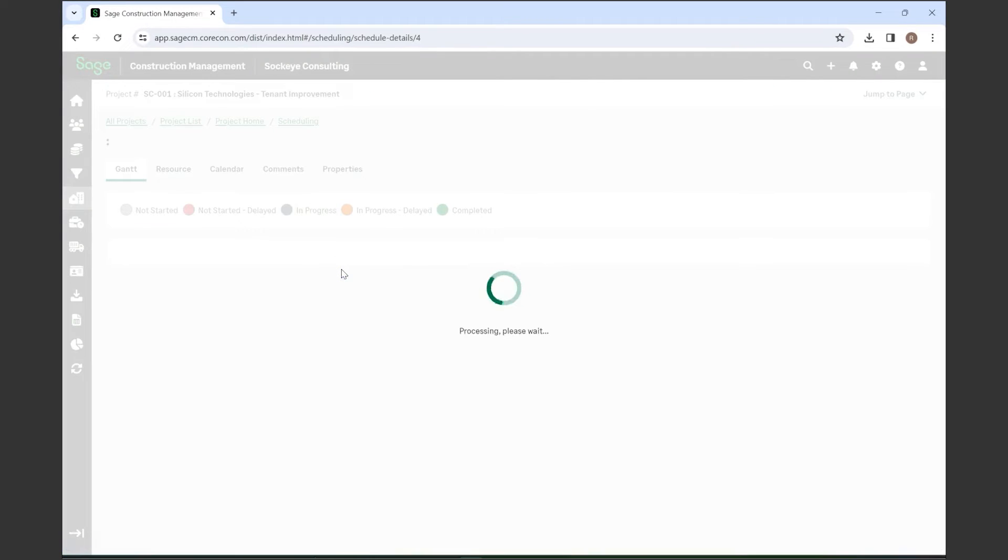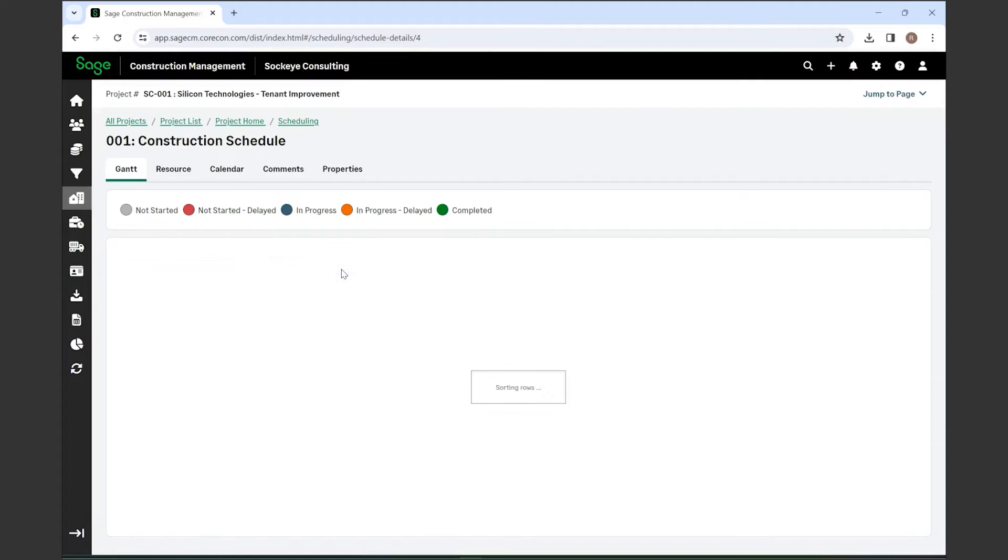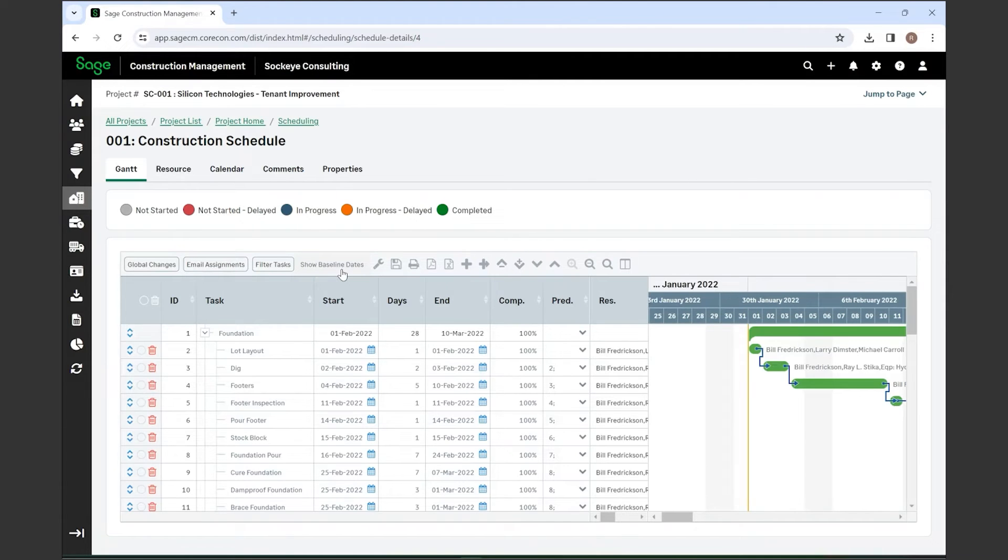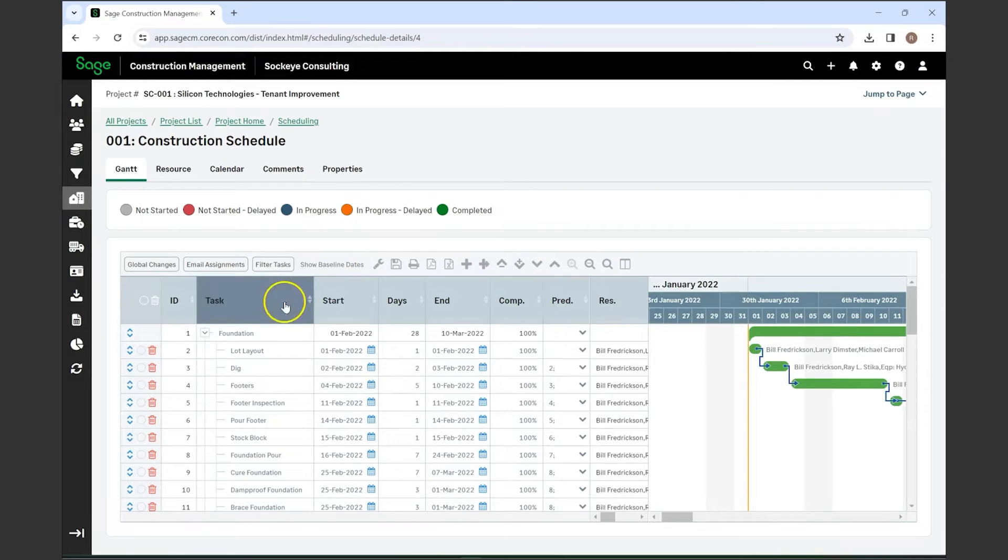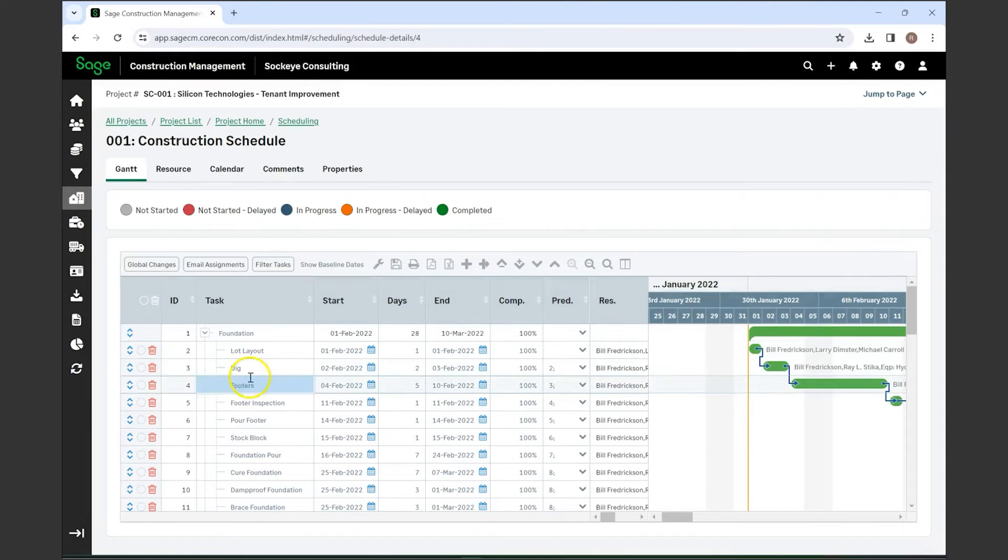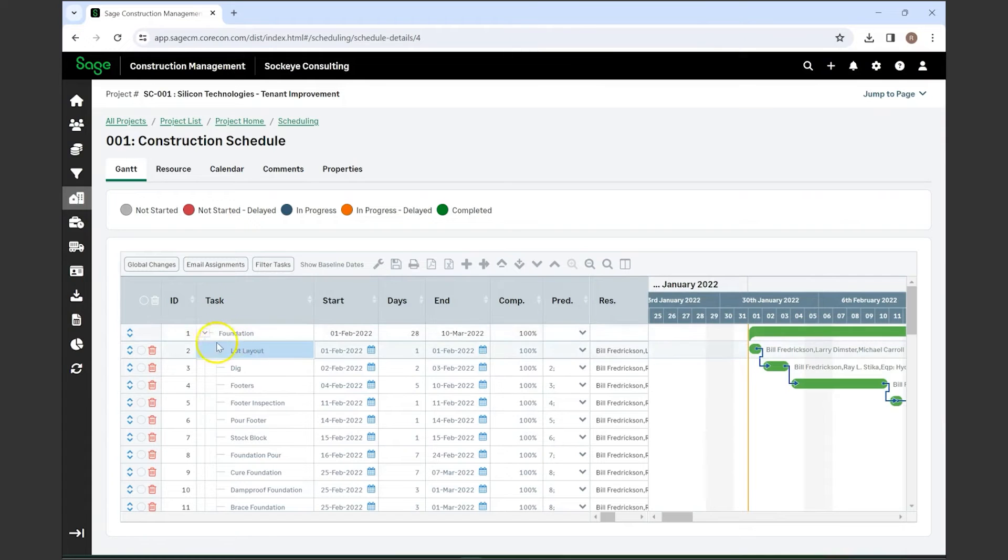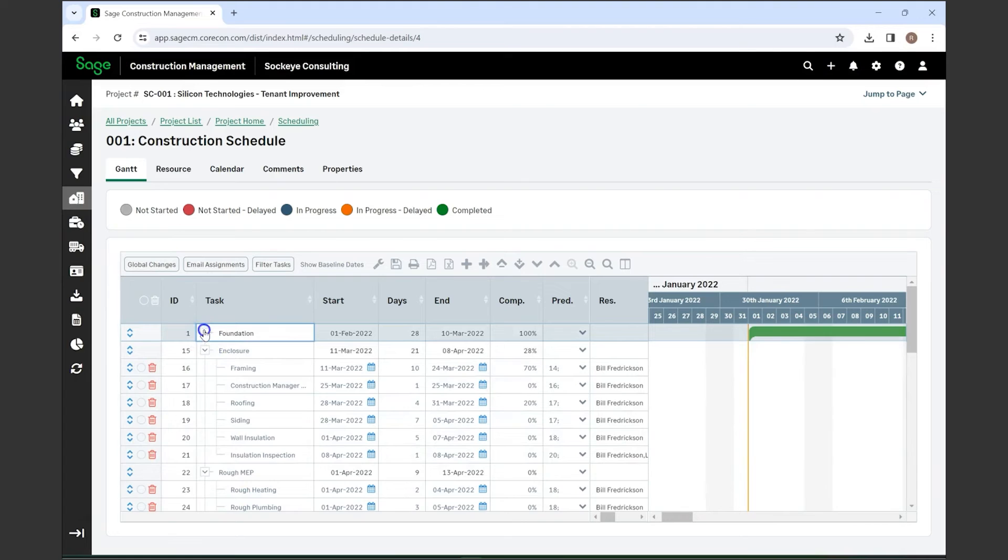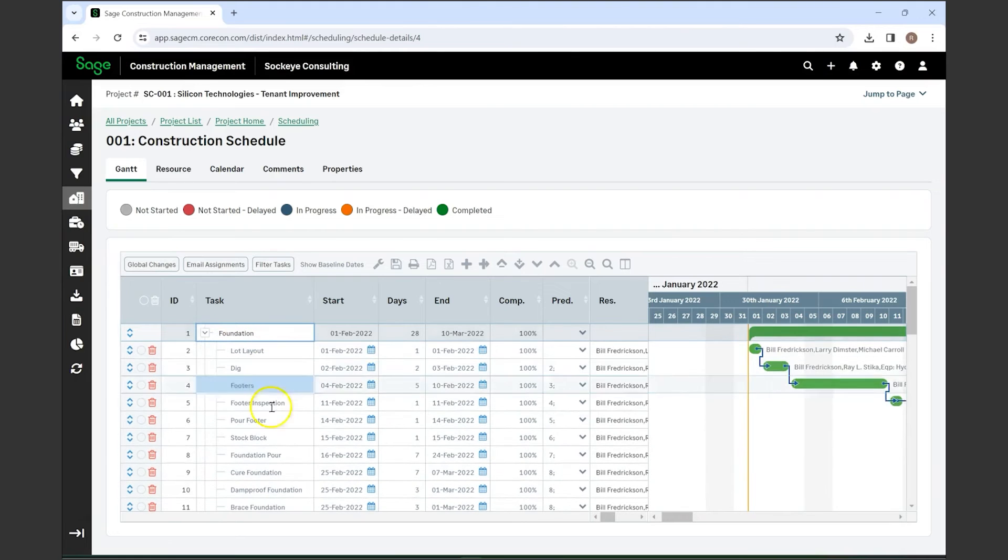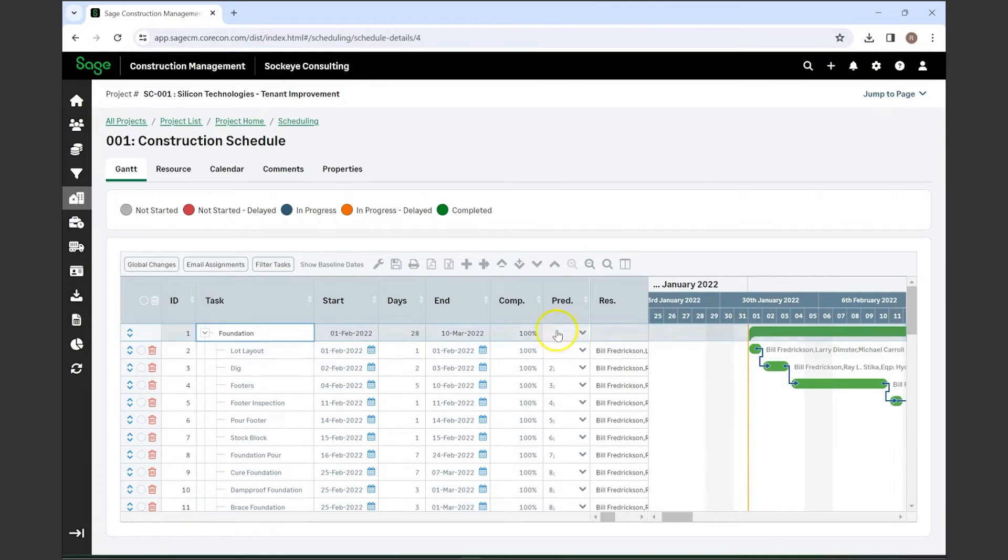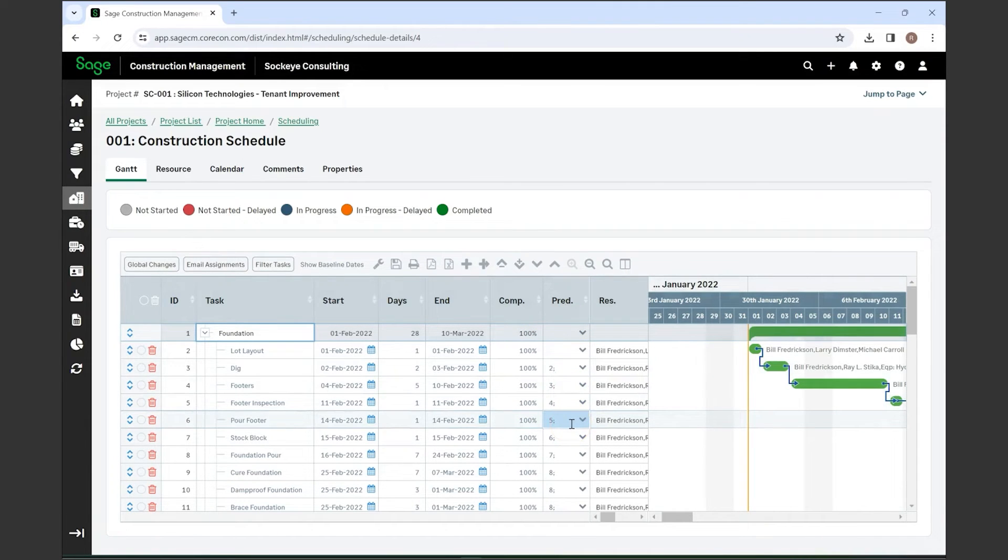When you click on the construction schedule, it'll open it up. Construction schedules are able to be imported from a scheduling software or you can create them in the system as well. You can make these as just individual tasks or you can make them as sub-tasks under a certain general area. This one is separated by foundation, enclosures, rough MEPs, and then within each of those they created sub-tasks. They can also be set up where they have completion entered in as well as any predecessors.